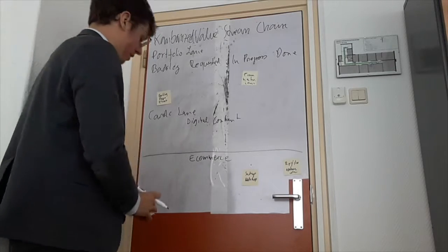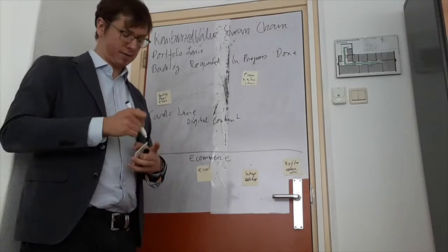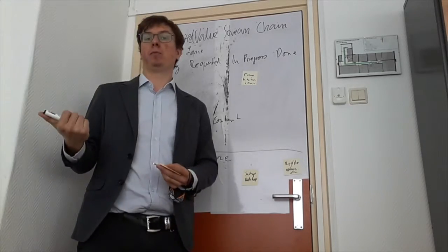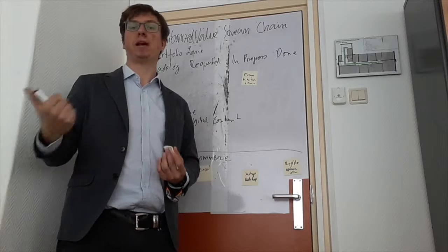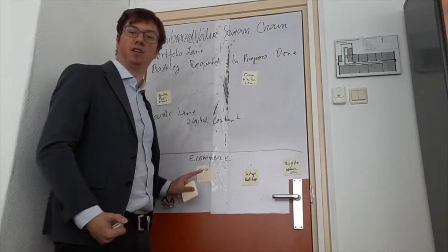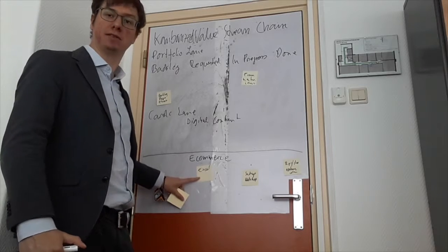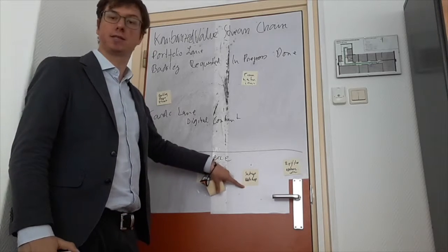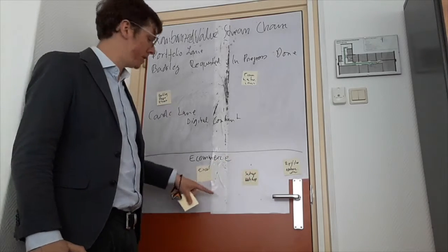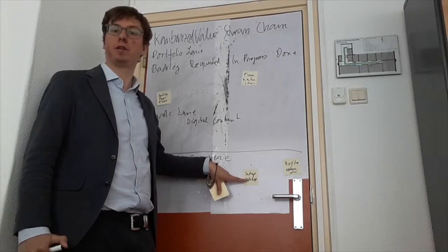And what he's doing, he's going to put this into requested, and he's going to assign this to the right person. And in the optimum setup, there is no email necessary, no Skype message, no phone call, because the boss will look at this Kanban board as soon as he has time, and he will see that there's a new task to create this Excel spreadsheet, which is currently blocking this task, set up web shop, so the designer cannot continue with this task, and he will have to do this task before the designer can finish up the web shop.